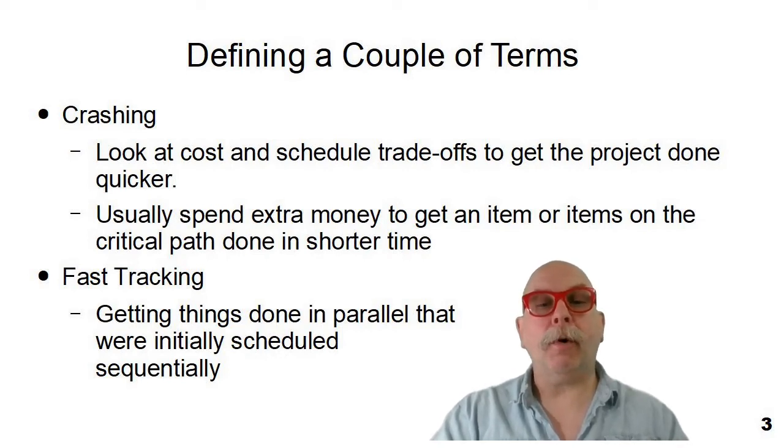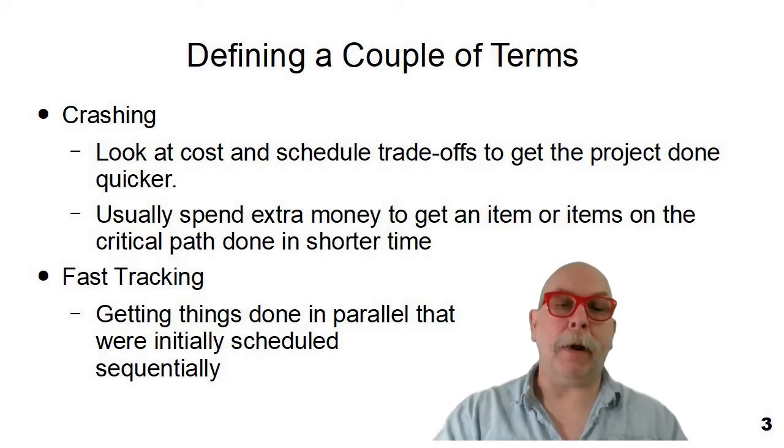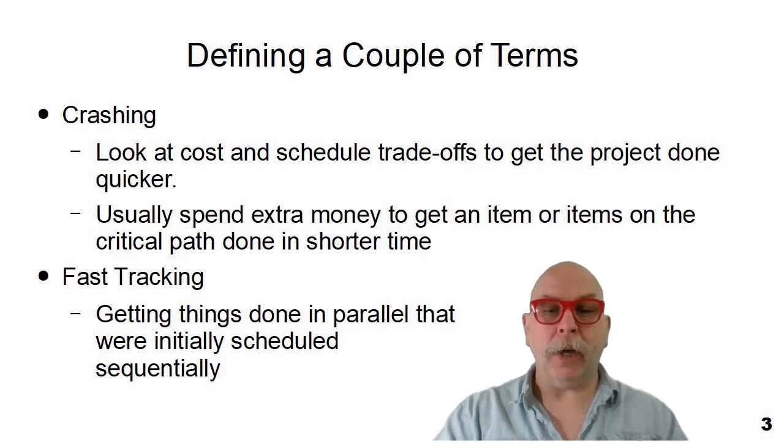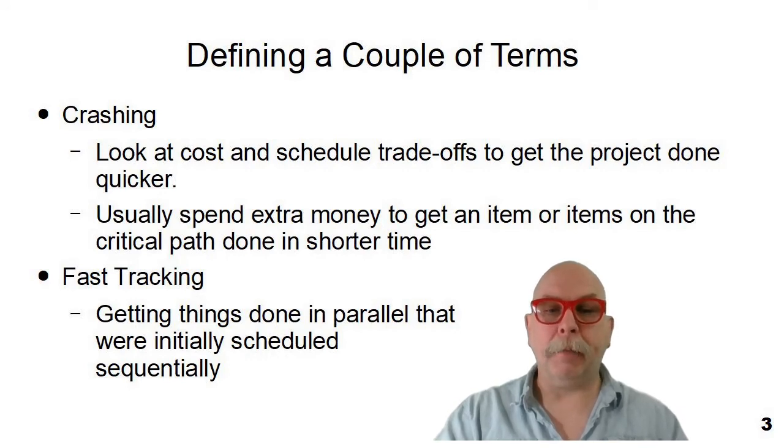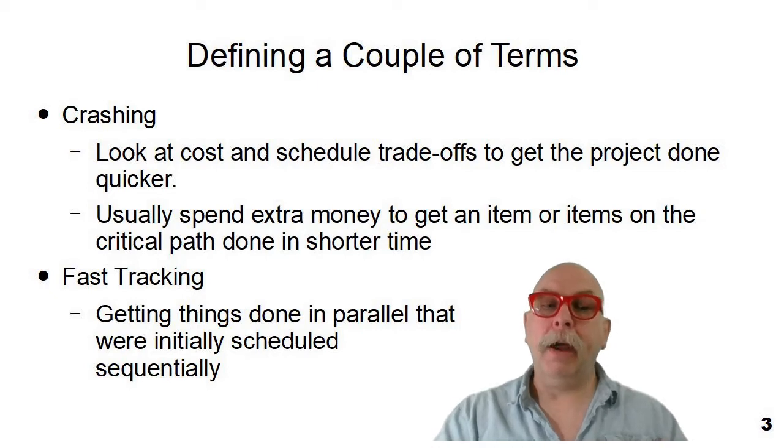Another technique for reducing the duration of a project is called crashing. And in crashing, we look at cost and schedule trade-offs to try to get the project done quicker. Remember the old adage, time is money, so is there a way to potentially spend a little bit more money, overtime, extra help, that type of stuff, to get tasks done a little quicker and thus reduce the overall time spent on the project.